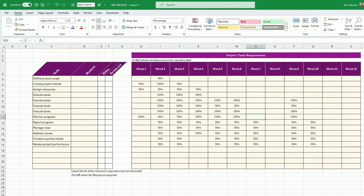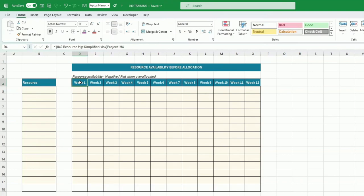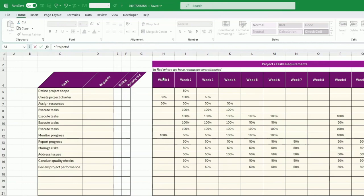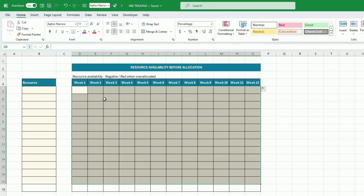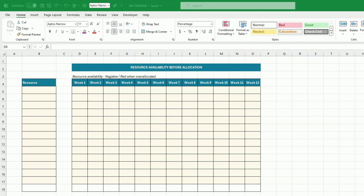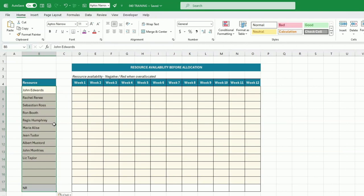Now we build the resources tab. It's important to have the same periods here, so just reference back to the first tab: type equals, refer back to the first cell, and drag across. You can have dates here instead. For each resource and each week you put the availability — 100% if fully available, or a lower value if there are holidays or if that person is involved in another project. I'll input some availability values now.